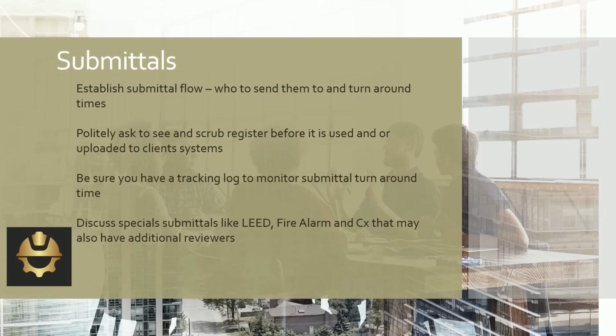And our last bullet here, Greg made mention of it, is discussing the special submittals. You're typically going to have a lead engineer that has to take a look at those. And I've had a lot of design firms that just rubber stamp them. They don't even look at them, and they tell us, we're not going to look at that, we'll rubber stamp it, so you send it to the lead person. Fire alarm is another one where it's typically self-designed by your fire alarm sub, and then it has to go to the fire department or whatever federal entity you're working for usually. And sometimes those do not go through the design firm.